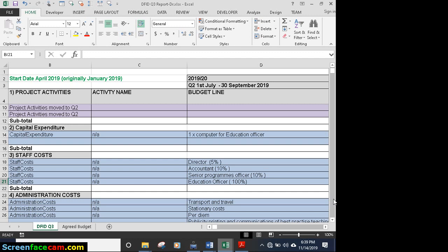The only other key person that should also be in the staff costs, maybe if we didn't put it there, maybe, but it is definitely in there, is monitoring and evaluation. That's another staff cost that should always be in the project proposal, because you need to monitor your project. And a lot of the time, your monitoring and evaluation should be anything between 10% to 50 to 60%, depending on how extensive the project is, all right? So, yeah, that is the only other person who's got the most weighting of the project.